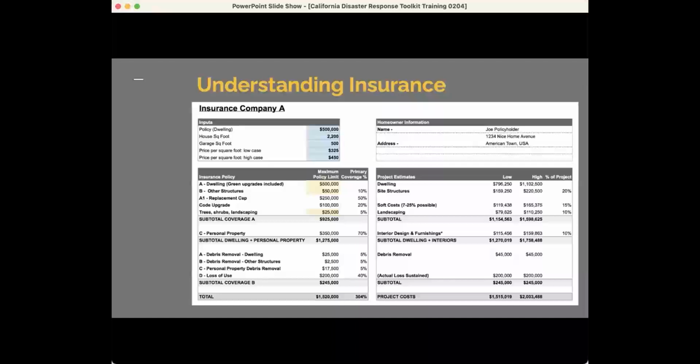On the right, on these charts that I make for people, I also put the low and high end of the cost of rebuilding the home that they want to build, and I try to equate that to the square footage and the going rates of construction. So it's just a very generic estimate.